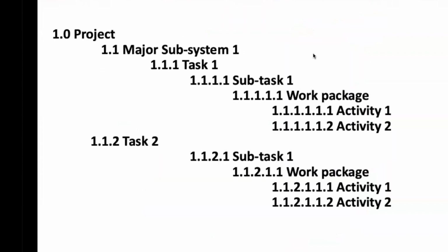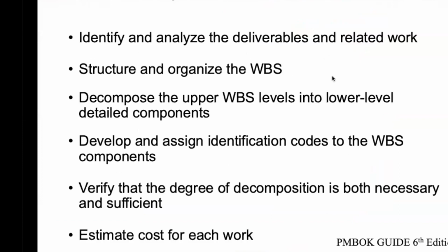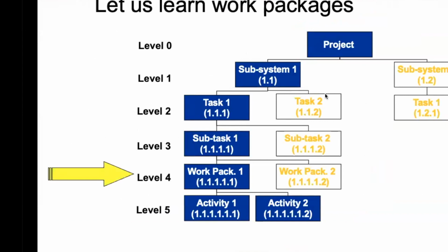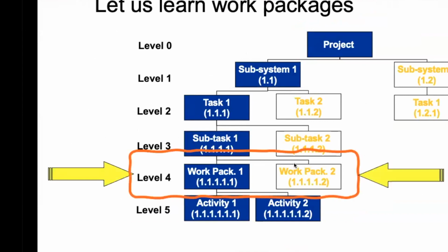So various types, we already talked about these things. So work package, there's this thing called work package, okay? Knowing, understanding work package is very important. So work package is level 4, right before the activities. After work package, there's activities. For example, as I said in the beginning, installing the tires in a factory can be a work package.